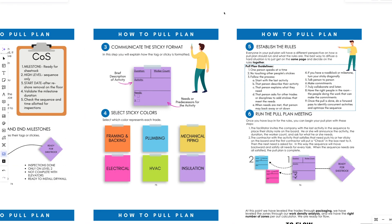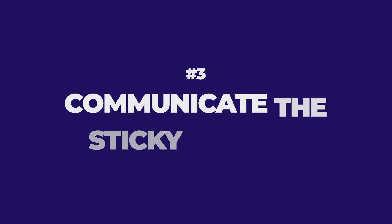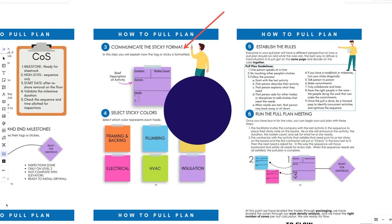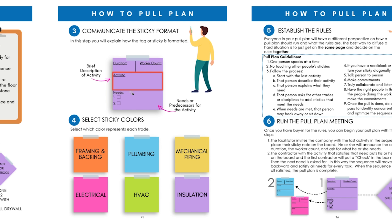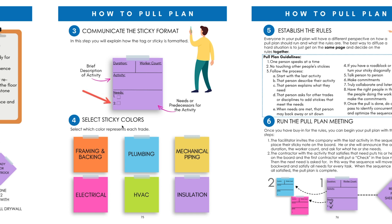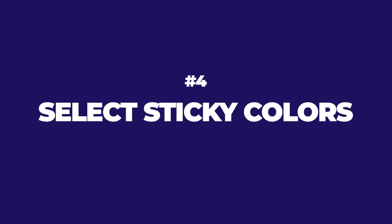Once we've established the milestones, communicate the sticky format — this is really important. The activity is common to all pull plans, but I need you to list the needs — also called predecessors or constraints, though I prefer 'needs.' This enables every trade partner to identify two things they need in order to have their activities done on time per their commitment.